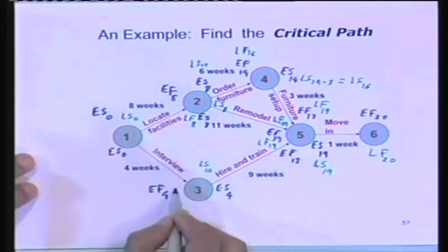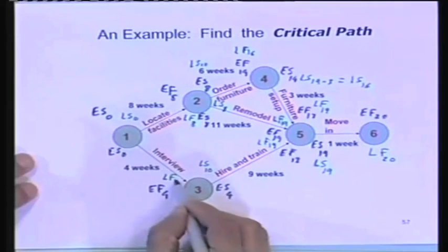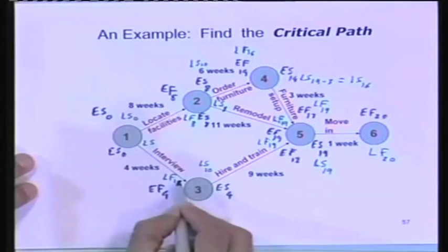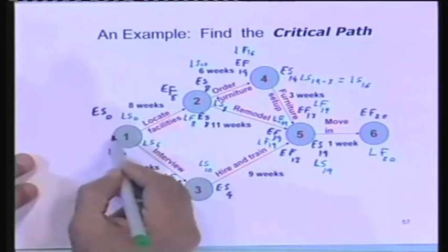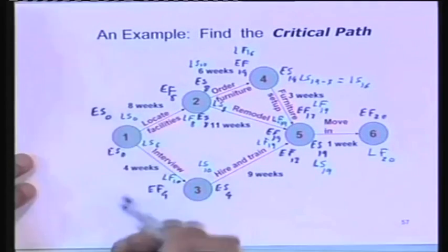Let's look at this side. The latest finish here is going to be how much? Only 10. And this one takes 4 weeks. What will be the latest start of this? 6. So therefore the project can start when? It can start at time 0. Now notice something.